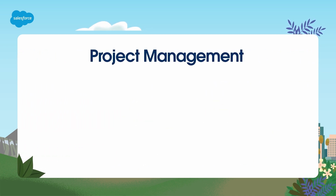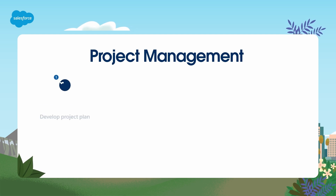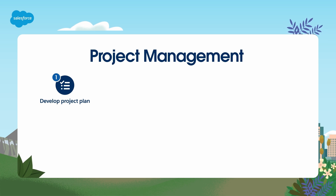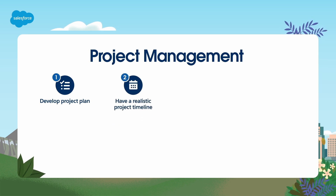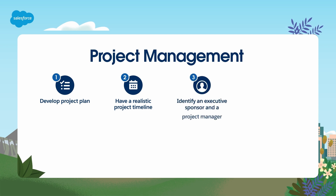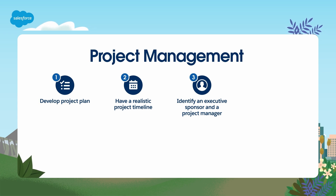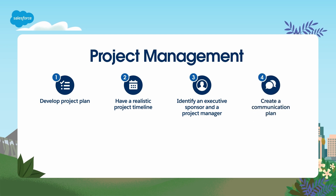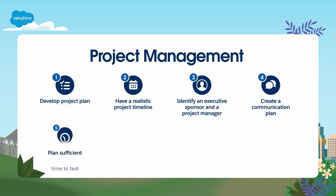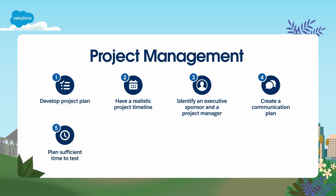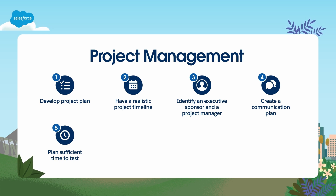Let's start with project management. Here are eight key project management tasks to keep in mind when you begin. First, follow a standard project plan for success. Second, make sure you have a realistic project timeline. Third, engage executive sponsors early on and identify a project manager. Also consider Salesforce services or partner involvement to increase project success. Next, have a formal communication plan — you'll want to communicate weeks in advance to impacted users. Fifth, allow sufficient time to test. Metadata and data migrations need to be tested and timed to estimate any outage windows during cutover.